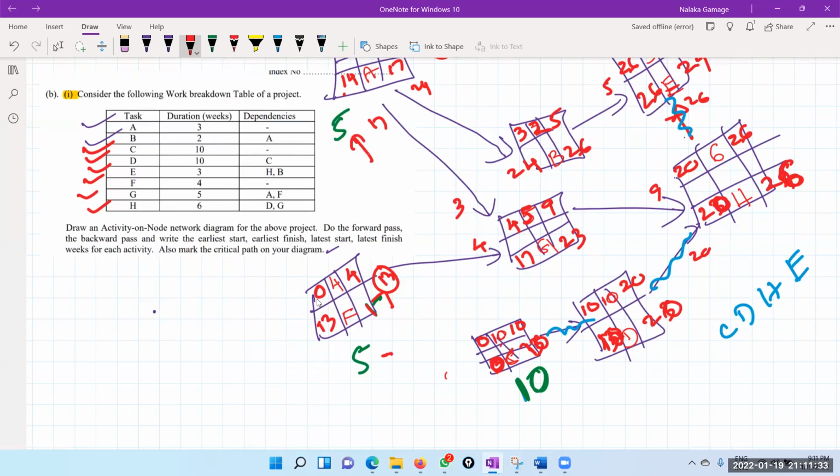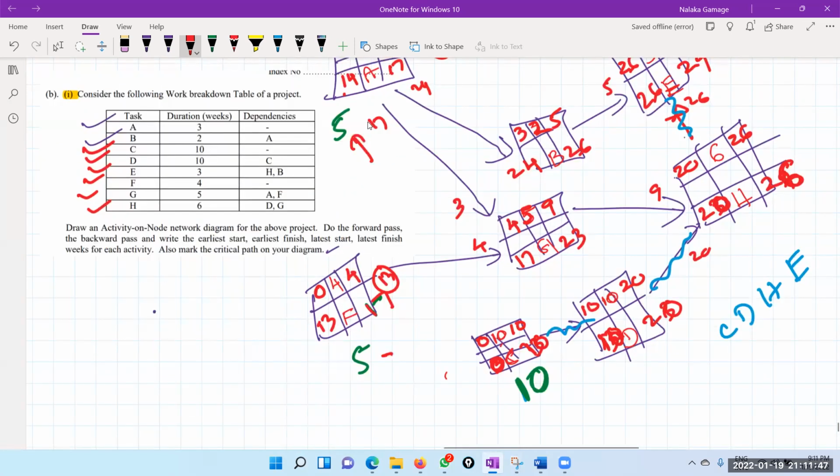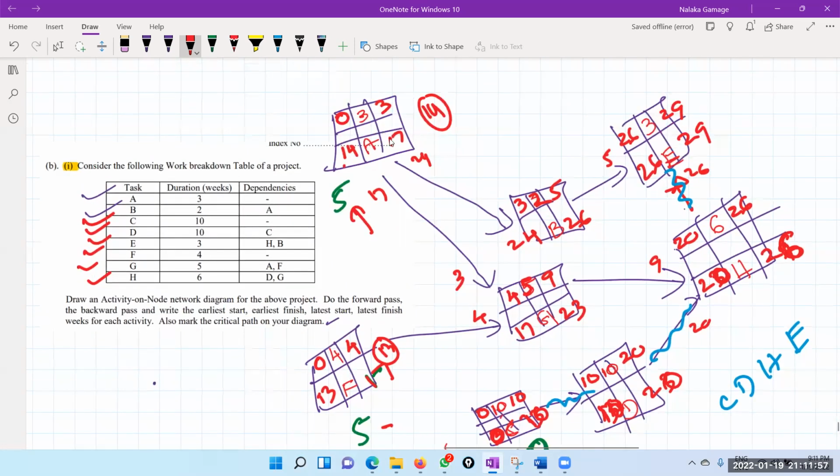We don't want to wait until this is done to start this one, because then we are in trouble. We are in trouble because if you start it on the 10th day, then we can finish it on the 13th day. Still it is possible actually, right? Even if you have only 5 computers, still we can do, because we can start this on the 11th day and we can finish it on the 14th day.